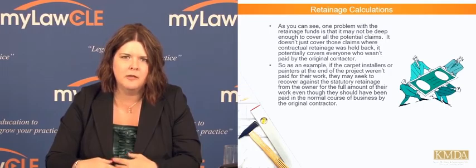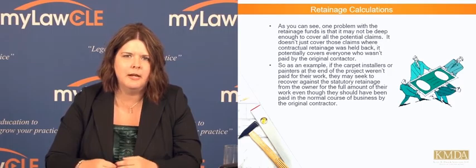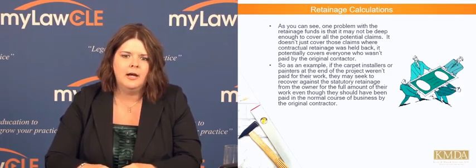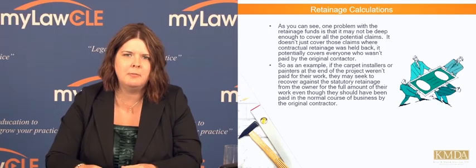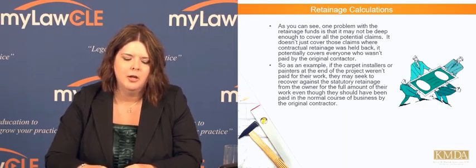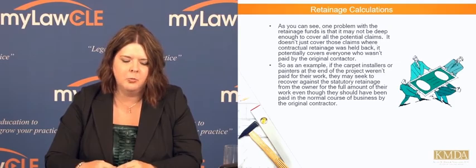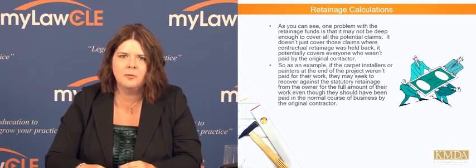So my rule within my firm is to file it as soon as we know there's a problem. If we know that there's a problem, we file it. I would rather tell somebody that we filed it early, and if it's not time yet, or they don't have the money yet, okay, that's fine. Pay me when you get it, but we're filing it. I would much rather say that than have to tell a client that they missed the deadline because they were waiting around. So that is something that we routinely practice within my firm.